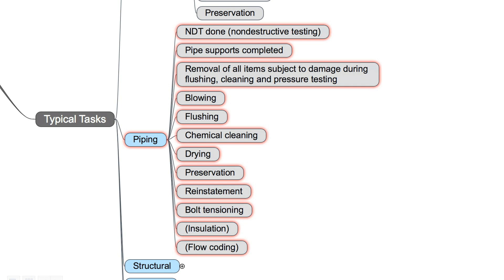Blowing, flushing, chemical cleaning, drying, preservation, reinstatement, bolt tensioning. Insulation and flow coating is included as well, but I put it here in brackets because during this time not all parts of the pipe will be completely insulated. Normally, only the straight pipes will be insulated and the flange connections will be free for later checking and, for example, if pre-commissioning tasks start later, for opening the flanges and to blow in or blow out. Flow coating will be done usually later as well.